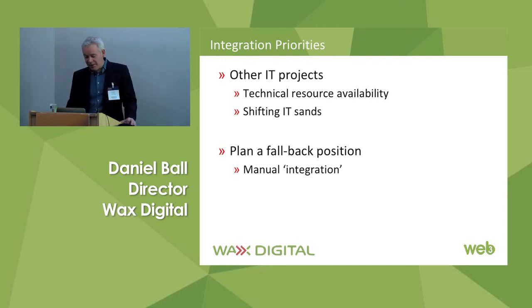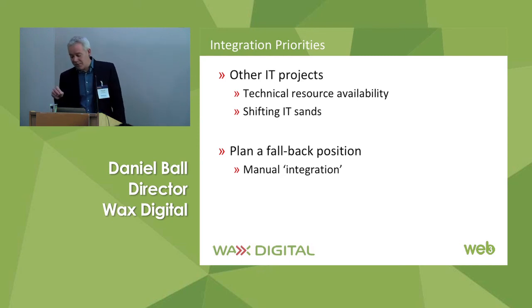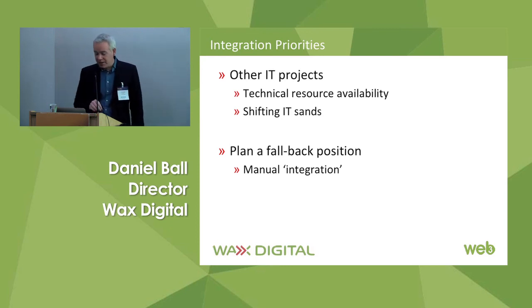which makes it fortunate in one respect that implementing a cloud-based procurement solution places relatively few demands on the IT team, but of course it does need to integrate with your finance system. So if your finance system is changing, if it's subject to any major work in the near future, be aware that that will impact your project.